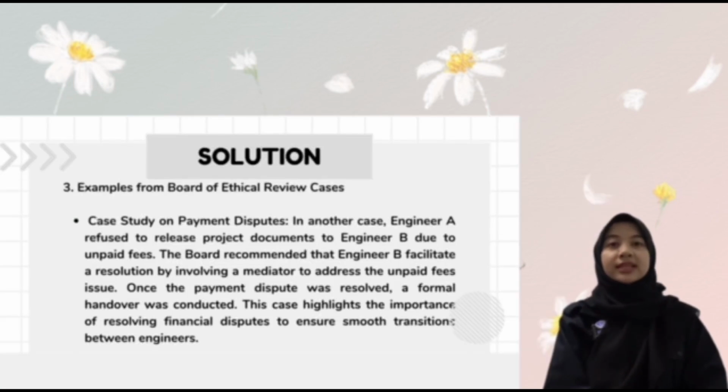Example from Board of Ethical Review cases. Case study on payment disputes. In another case, Engineer A refused to release project documents to Engineer B due to unpaid fees. The board recommended that Engineer B facilitate a resolution by involving a mediator to address the unpaid fees issue. Once the payment dispute was resolved, a formal handover was conducted. This case highlights the importance of resolving financial disputes to ensure a smooth transition between engineers.